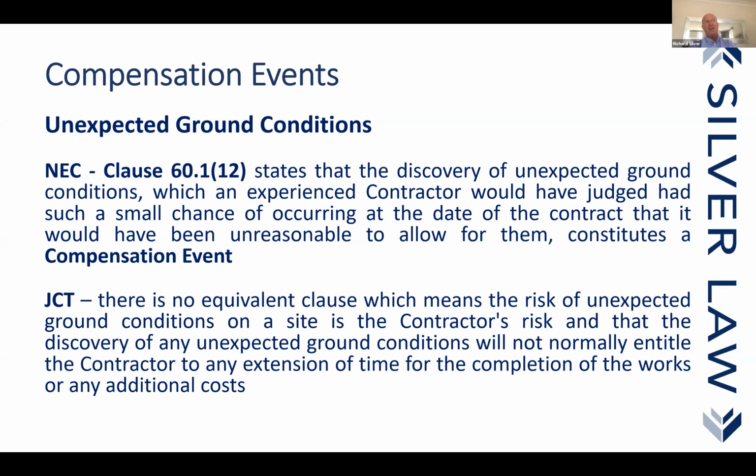It's because of that that quite often, whilst the employer issues soil reports and the like at tender stage, they are not contract documents. The reason is the employer is trying to get away from being in breach of contract. There cannot be an error in documents in the contract if those documents are not contract documents. So that's why they're often issued not as a contract document.